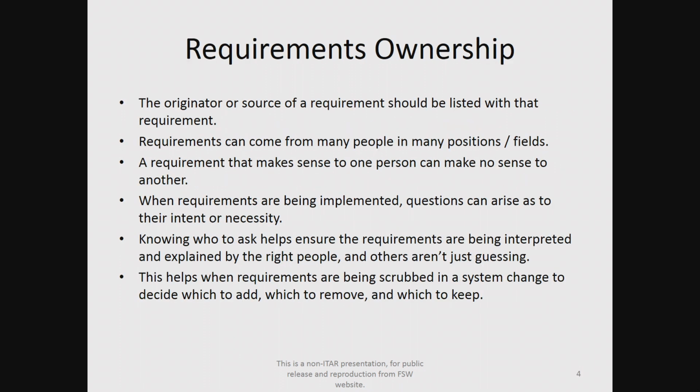For requirements ownership, there really should be somebody who owns that requirement, a point of contact. So whenever there's a question as to what the intent of the requirement was, the developer can go back and ask that particular person, okay, what did you mean when you wrote this, as opposed to something being passed along in a bunch of documents and people guessing at what the requirement meant because nobody really knows whoever came up with it.